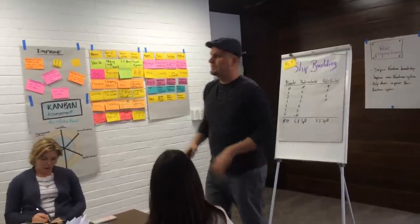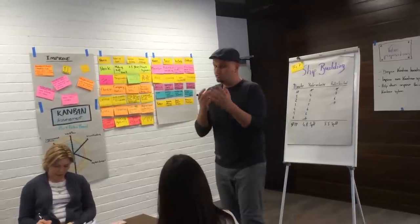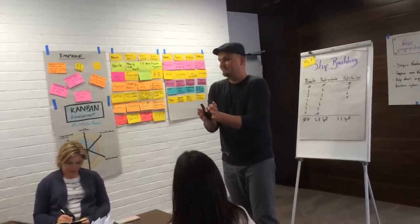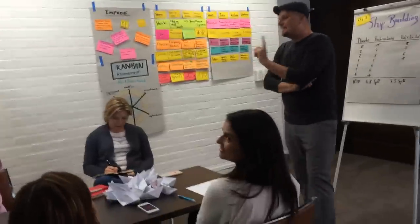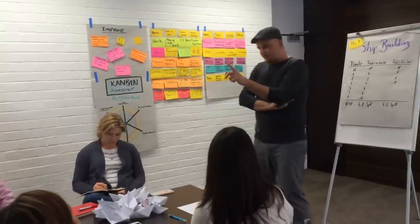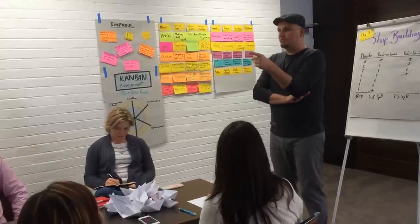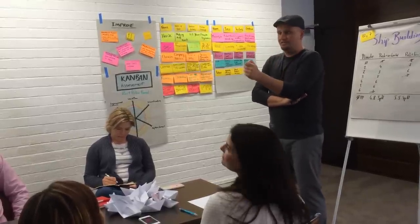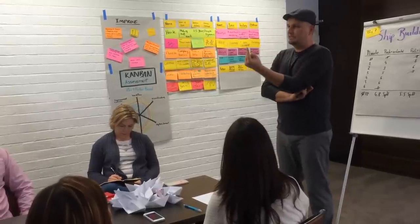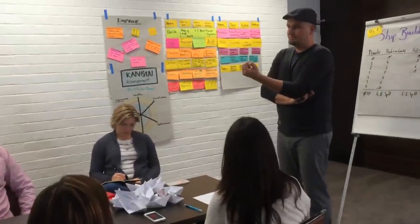So we absorb variation by introducing this buffer. And now, you are a really a folding expert. They can never do this. You are the specialist. She goes on leave, but nevertheless, she is the specialist, so she's doing 5 ships per minute. Even if you only do 1 ship per minute, it's 1 ship more and increases our throughput, increases our revenue. So in our world, she's doing a task in a day and you need 5 days for it. But it's still worth doing because we're earning more money with this. Does it make sense?